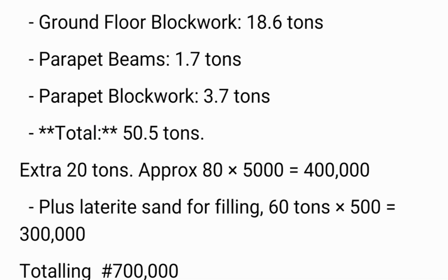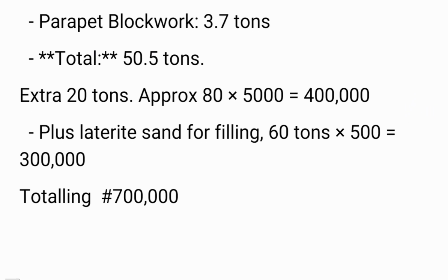So you have to add some, and that is why I calculated an extra 20 tons here to give us 80 tons. It might be much, so it depends on you. And that gives us 400,000, at about 5,000 per ton. Okay, so plus the lateral sand for filling.